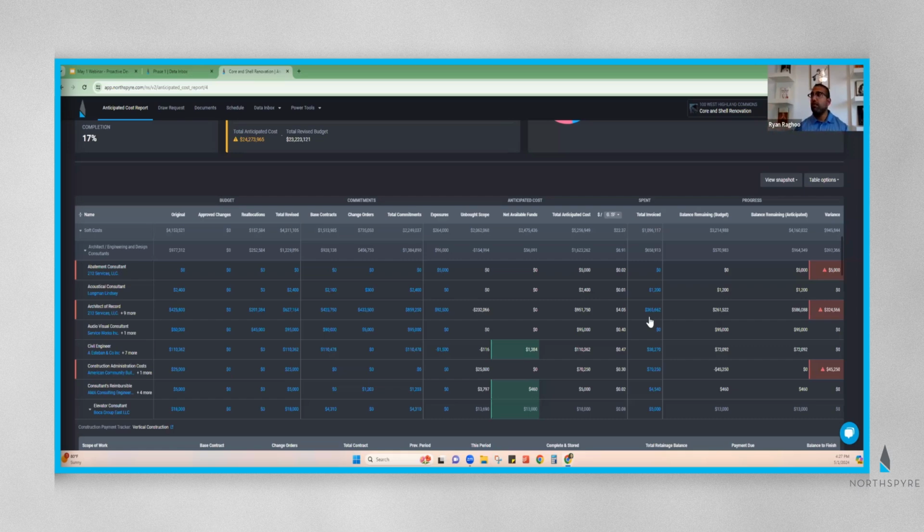But because Northspyre is looking out into the future, always forecasting what those potential risks are going to be, the system's able to tell us, well, hey, you're in great shape today, but you've got a contract of $859,000. And by the way, you've got exposures of $92,500. And so your anticipated cost, where we see you ending up at the end of this job on this particular budget line, is $951,000. And because of your $627,000 budget, you're about $325,000 over.